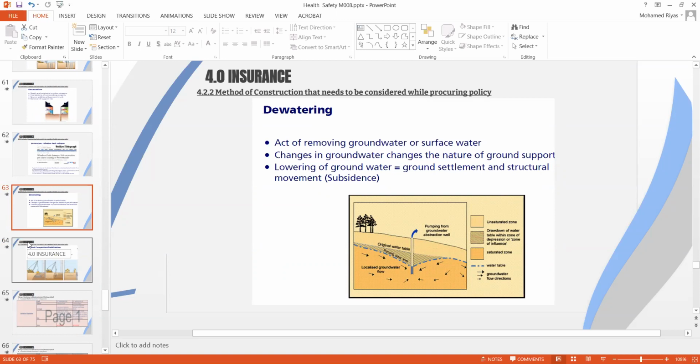The second point: when you list these risks, you need to take action, either to mitigate or to transfer. The one pure form of insurance is the risk transfer. You're transferring your risk to the insurance company, and you're paying for this with a premium. So there is a cost involved for that.